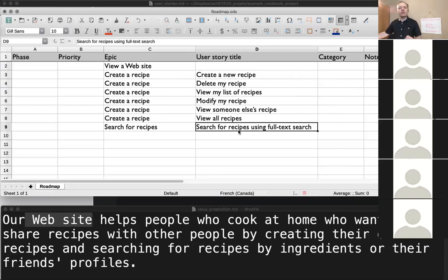You will need to break that into smaller tasks, but you will do that with the team when you do the backlog grooming or the backlog inspection before the sprint planning sessions. If you do Scrum. If you do Kanban, you don't need to do sprint plannings, you just go with the flow, but you still need to check with your team to evaluate if it's doable or not. That's the developer team who will help you with that.